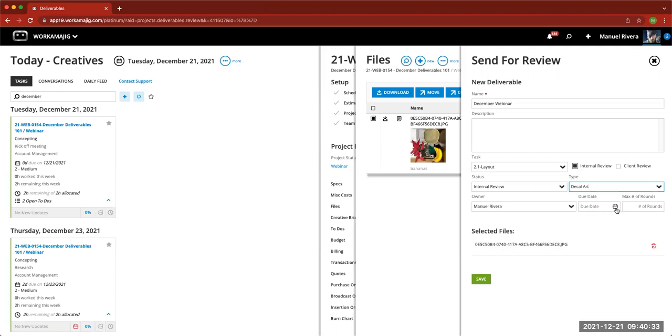You can set up due dates and a maximum number of rounds, and that's also going to allow you to see, okay, I set myself a goal to have a due date when this should be done by, and I passed that date, and now I'm seeing in the report where I'm at, so that I know that we're behind, or this should have been done sooner. Those tables and reports can talk about that, as well as the number of rounds. We can reference these fields for that. I don't usually interact with these too much, so I won't.